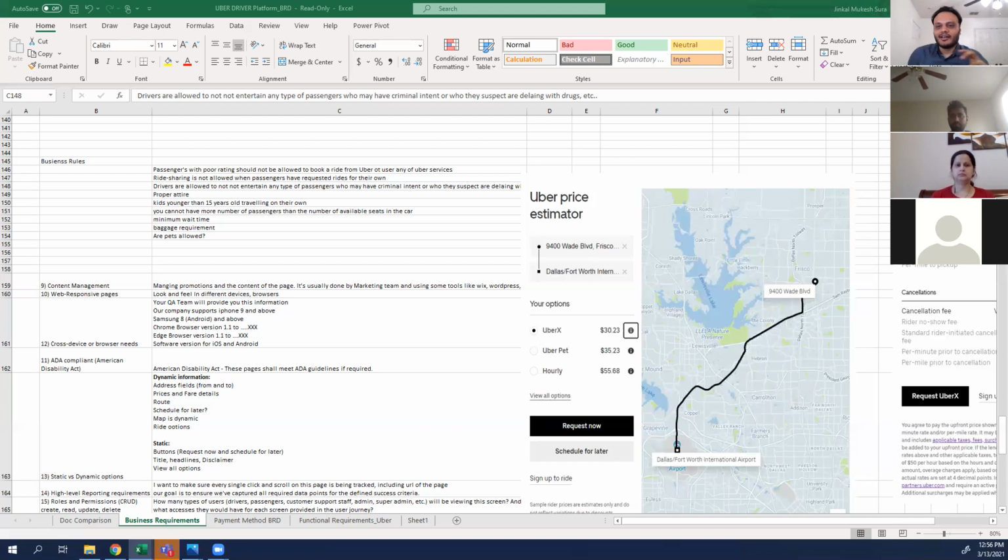What is agile? Nobody waits on anyone. Just start doing your stuff in parallel, right? So Shrey is not waiting on me completely to start his work. He's just waiting to get some basic information to start his work. And likewise, Samrit is going to start her work based on some inputs from Shrey, and likewise Revant. And we were able to accomplish the same task in less than a minute. How much time saving did we have? 3 minutes and 25 seconds to 48. It's 1/4 of the time.